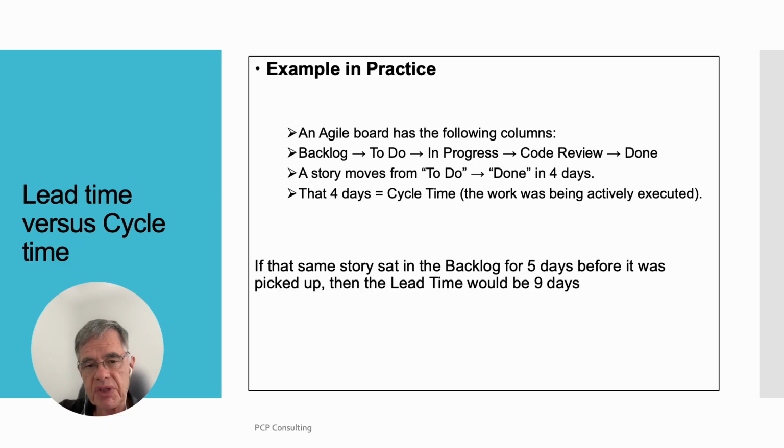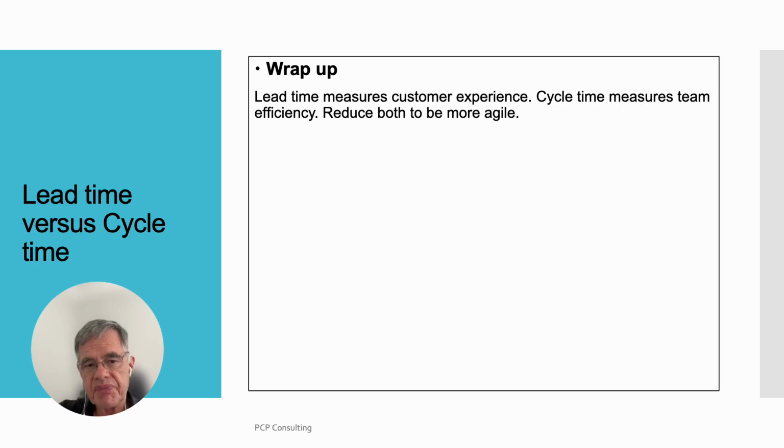If that same story sat in the backlog for 5 days before it was picked up, then the lead time would be 9 days. Wrap up. Lead time measures customer experience. Cycle time measures team efficiency. Reduce both to be more agile.